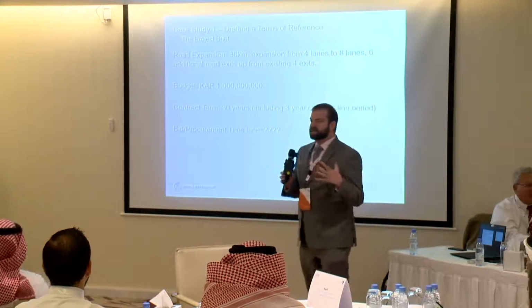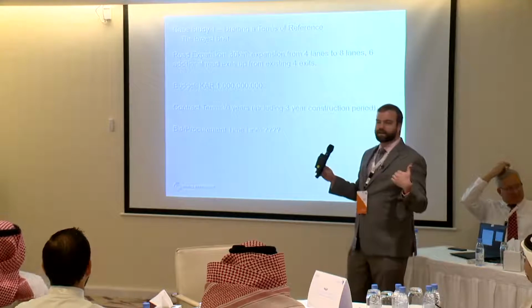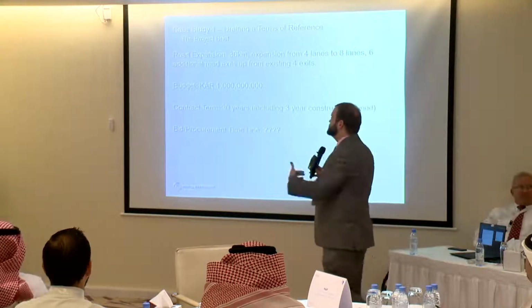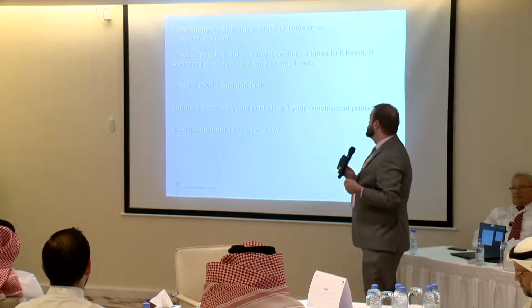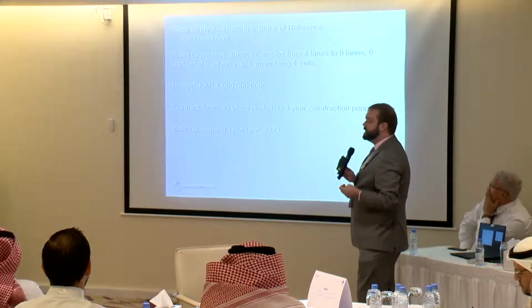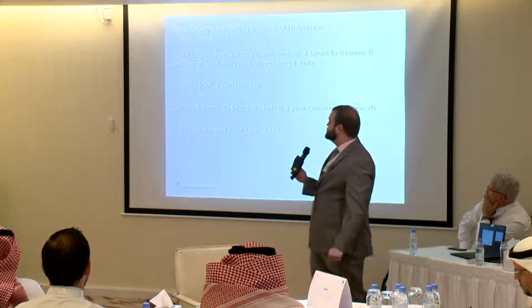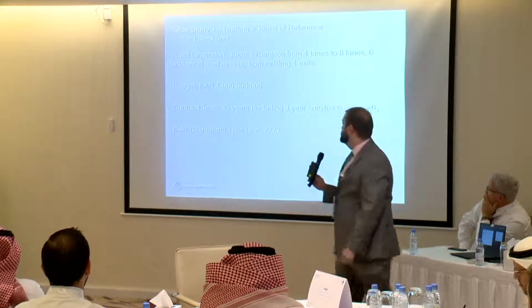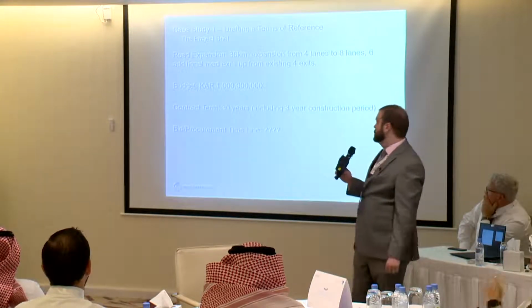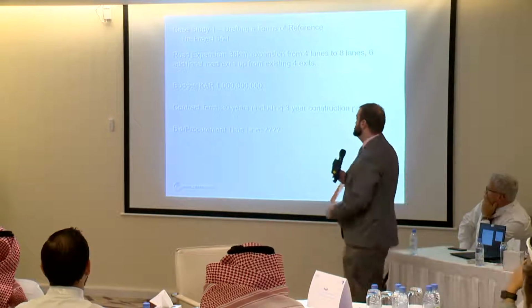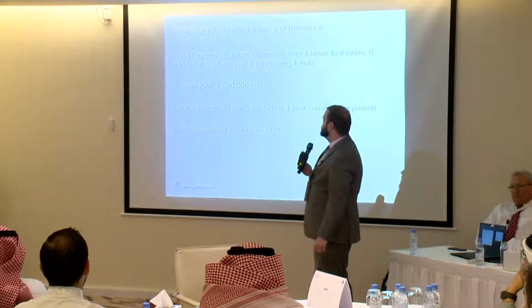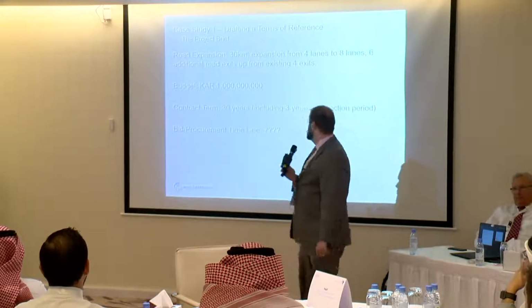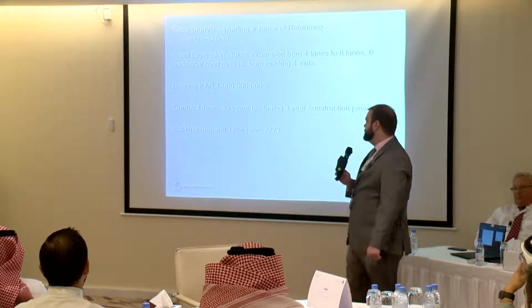The road expansion is for a 30-mile stretch, again, a 30-kilometer stretch. Again, this is just going from the airport to the city. The expansion is going from 4 lanes to 8 lanes and adding 6 additional road exits from the existing 4. The budget, 1 billion real. Contract term, 30 years, including a 3-year construction period.